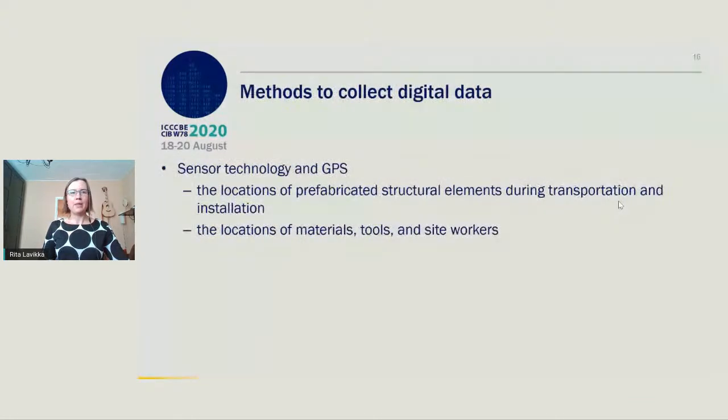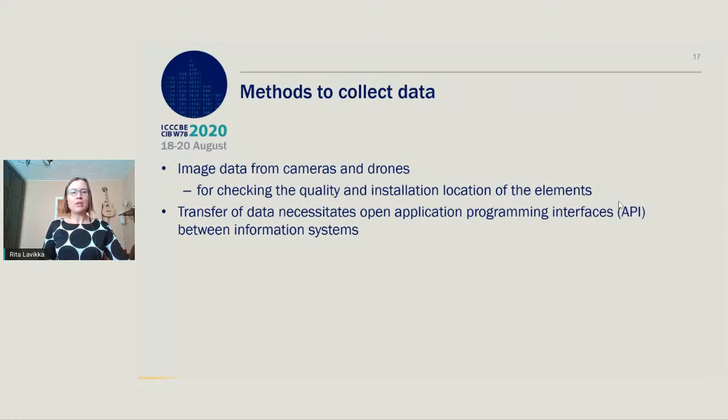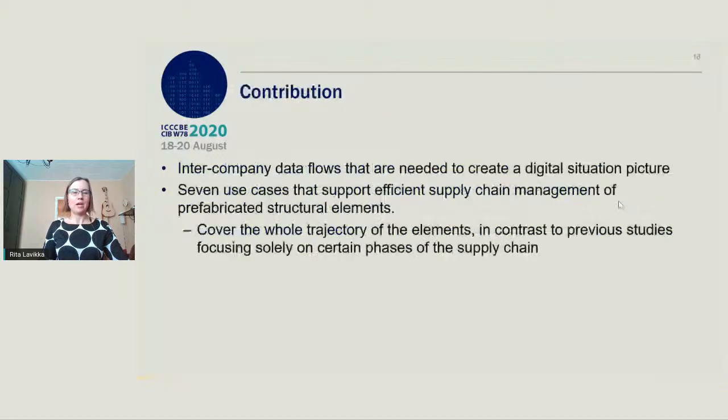We also envisioned methods to collect data in machine-to-machine format. One method is sensor technology with GPS, which was considered suitable for locating the prefabricated structural elements during transportation and installation. Other methods are image data from cameras and drones that could be used for checking the quality and installation location of the elements. Transfer of data would necessitate open application programming interfaces between information management systems.